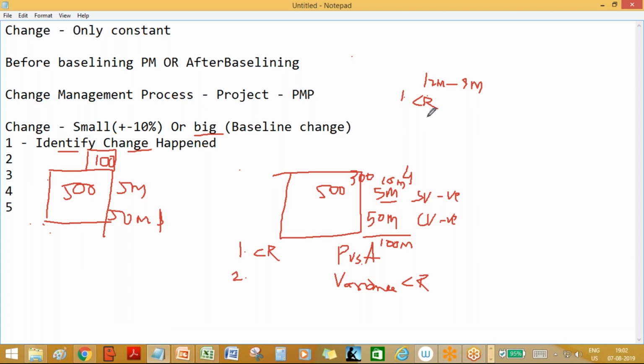So what are the three changes we are understanding? Scope change is also a change. Missing your deadline and wanting to revise the baseline is also a change request. Customer revising the schedule baseline is also a change request. Change requests can come from so many places. Many of the processes in executing, monitoring, and controlling will give you an output of change requests. Whenever there's a major impact to the baseline, you'll go through this process.